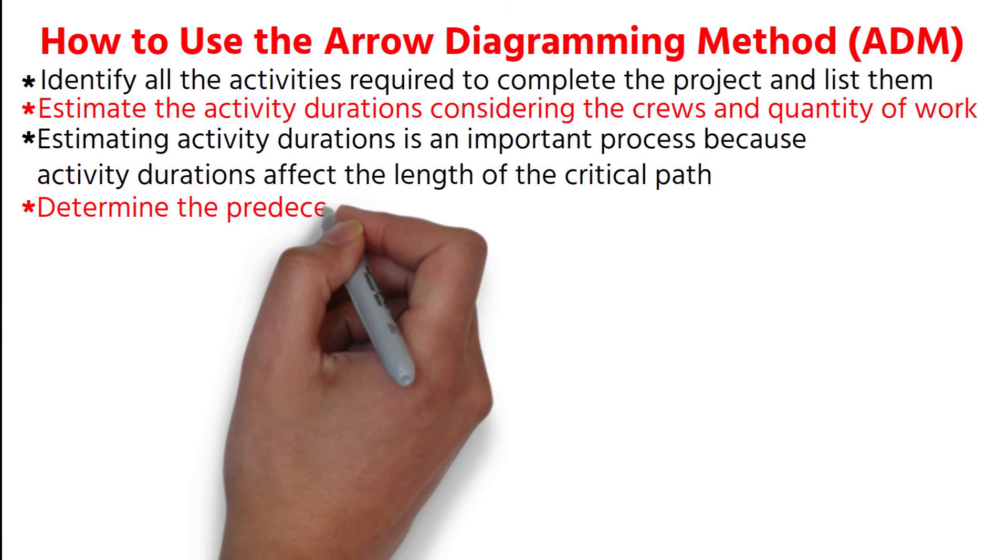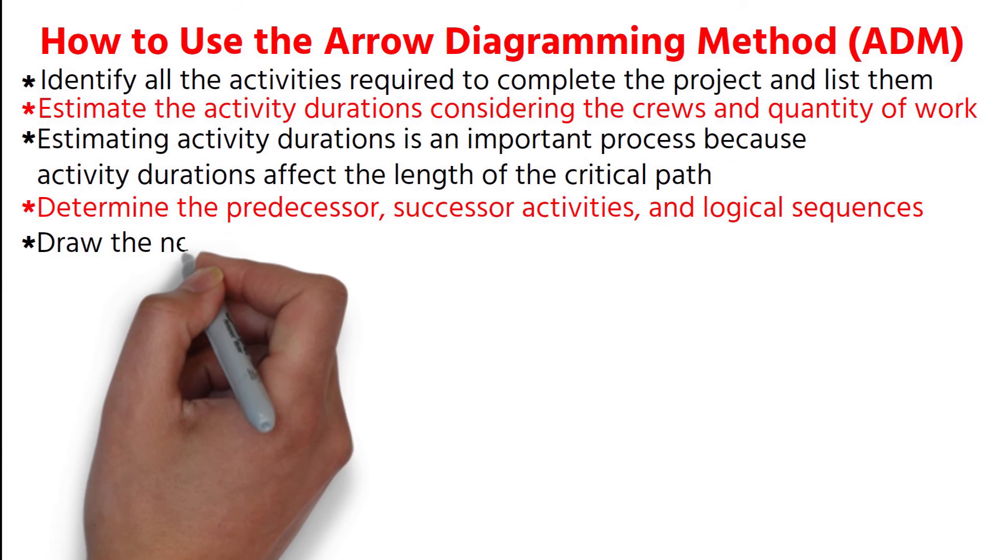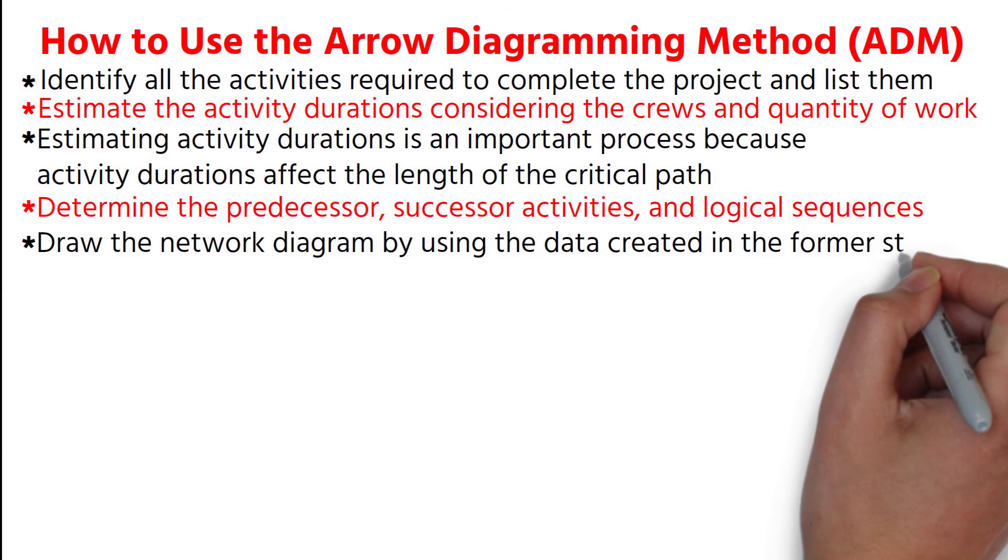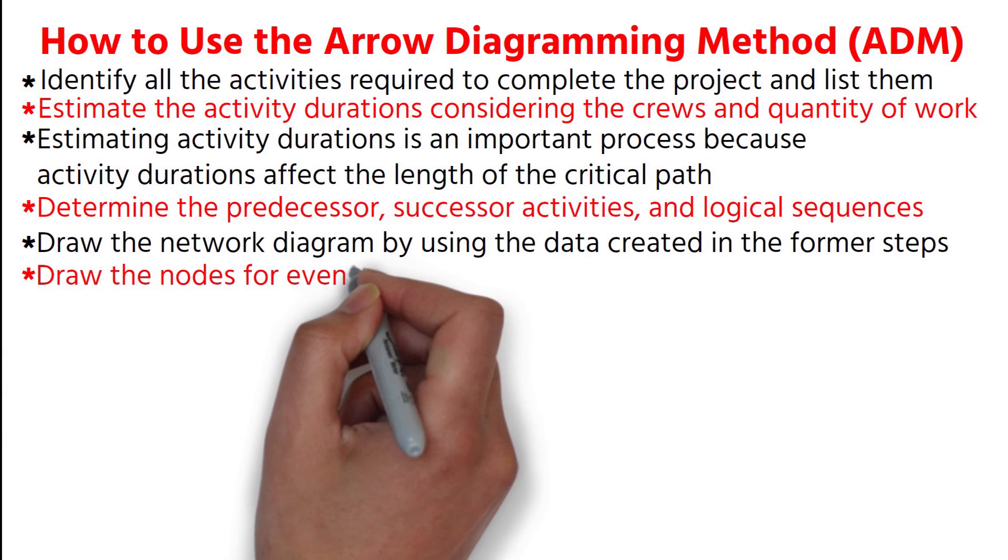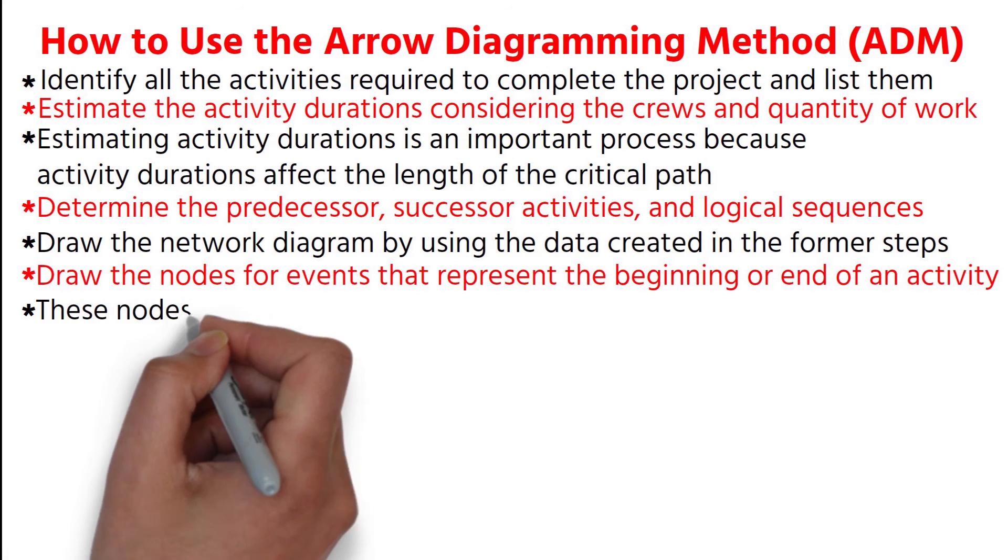Determine the predecessor, successor activities, and logical sequences. Draw the network diagram by using the data created in the former steps. Draw the nodes for events that represent the beginning or end of an activity. These nodes separate the activities.